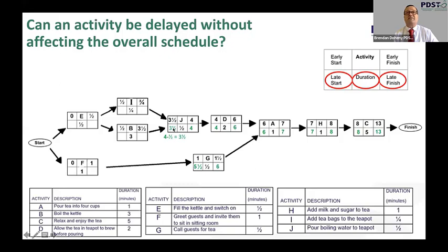Well, if the latest start for J is 3.5, we would hope our students would suggest that the latest finish for both of these would also be 3.5. Our students can again nominate the answers as a quarter: 3.5 minus a quarter is 3.25, and 3.5 minus 3 is a half. Before we get to E up here, we'll follow along this line down here from G to F. So we said that G had a late start of 5.5, which means that F can finish no later than 5.5, which gives it a start time of 4.5.